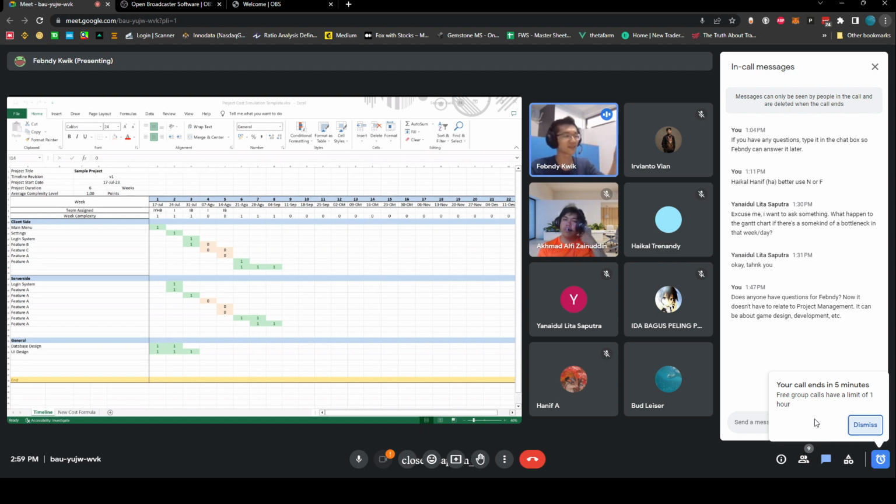That's why most of the things in my timelines only take 1 week, 1 week, 1 week, and so on. So it's part of how I design the system, like the applications that we actually use. But it's also a good practice to make the modules as small as possible for your projects. That way, sometimes there are clients that have to be finished as soon as possible. That means we're going to be adding new team members, and if we have more team members, separating them into modules is going to be easier.